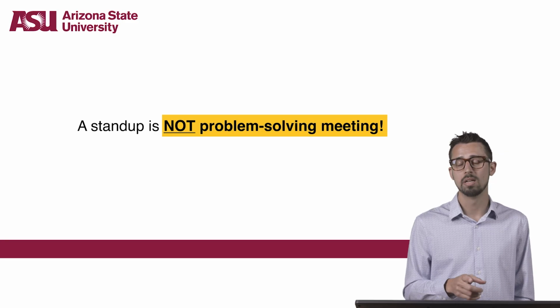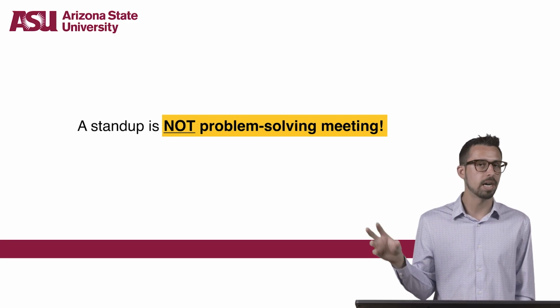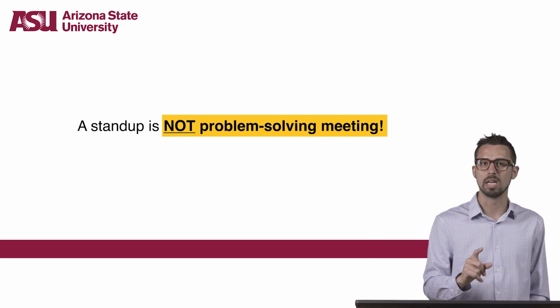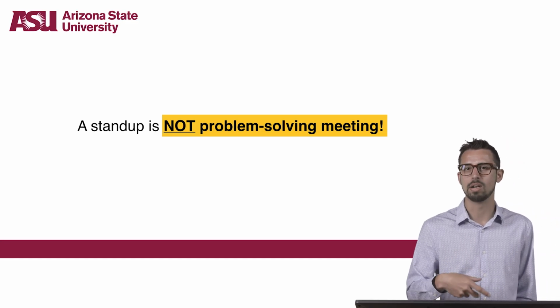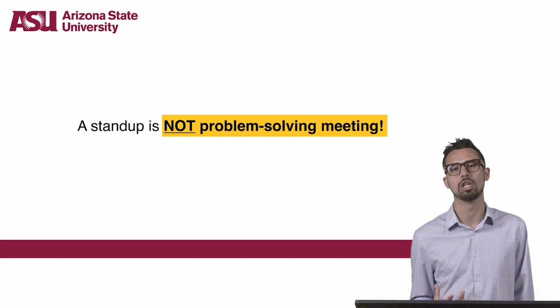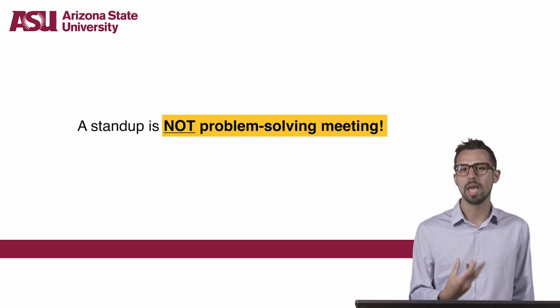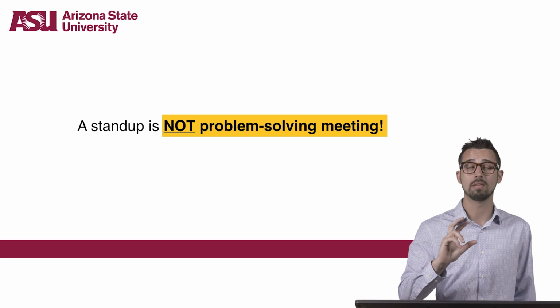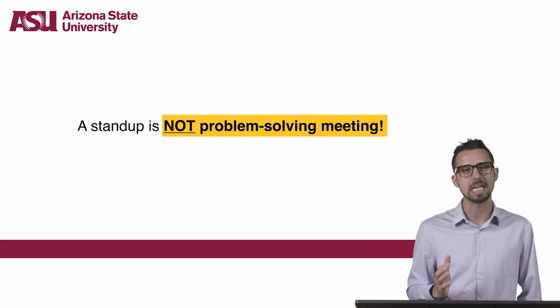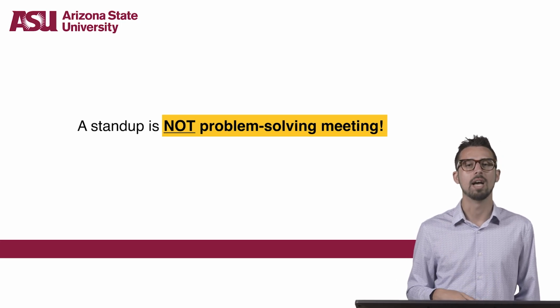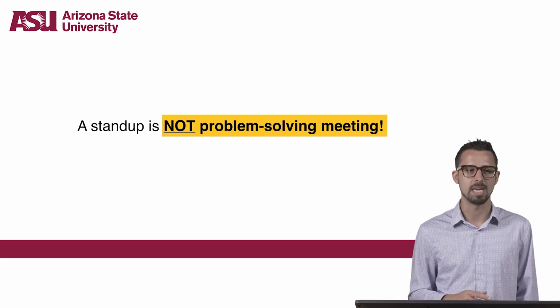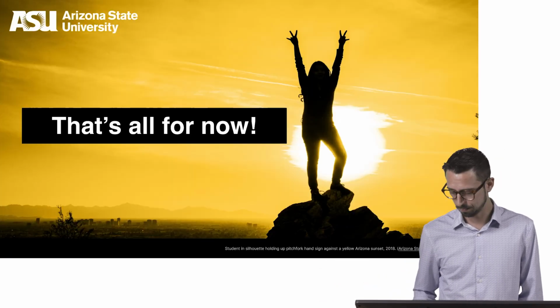When run well, stand-ups can be very, very useful, provided that the nature of the team's work requires that level of intense collaboration. So make a conscious decision about when the team needs or can effectively use stand-ups, because it may not be daily, it might be weekly, it might be twice weekly, it might be every other week.